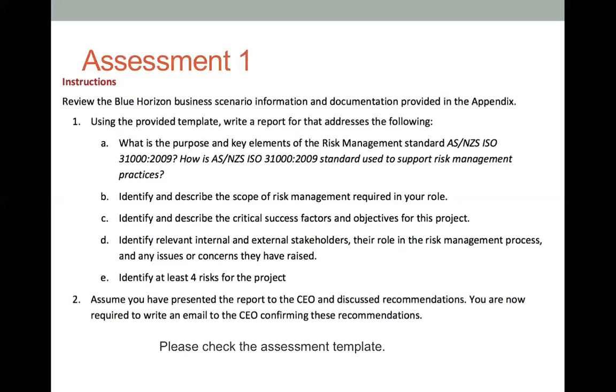What do you mean by on time? Well, 3rd of November, for instance. We need to receive them by that day. If not, then we need to delay the new product launch. As a result, we can't achieve the sales increase target.